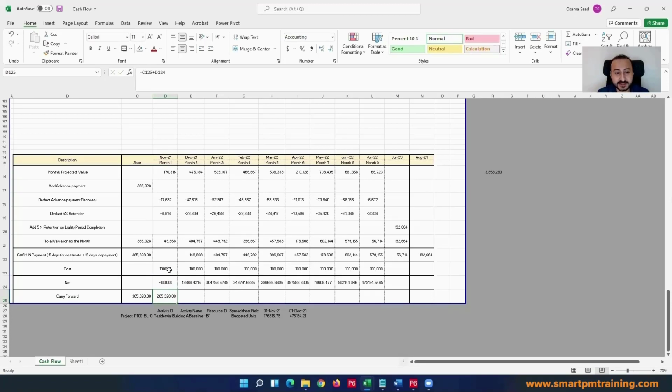So I had negative for this month alone because it's a special case, right? Because I am paying the money, but I did not receive anything in my bank account, although before the month starts, I had advance payment in my bank account already. So although there is a negative value, you already have credit to cover you up, and now it will be cumulative with you, right? Yeah, so something like that.